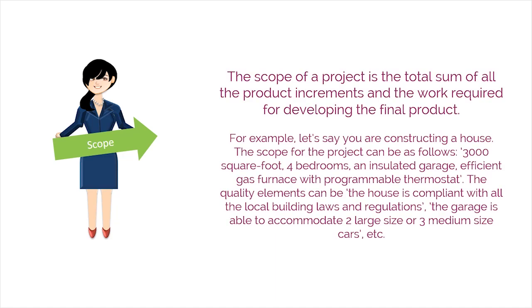The scope of a project is the total sum of all the product increments and the work required to develop the final product. For example, let's say you are constructing a house. The scope for the project can be as follows: 3,000 square foot, 4 bedrooms, an insulated garage, efficient gas furnace with programmable thermostat. The quality elements can be: the house is compliant with all the local building laws and regulations. The garage is able to accommodate 2 large-size or 3 medium-sized cars, etc.